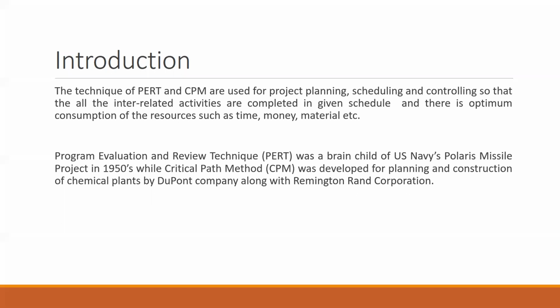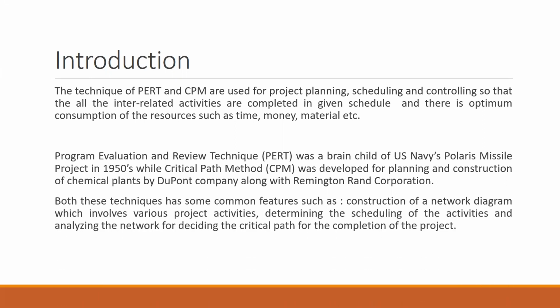The network diagram can be analyzed, and using CPM, as I told you, the main purpose is to find the critical path. Once we draw the network diagram, we can easily figure out the critical path or the critical activities and focus more on those activities and try to complete them in the given schedule or time, so that my overall project does not get delayed. Even though both of them require the network diagram, there are many things which are different.